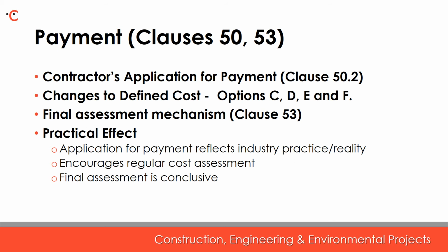NEC4 provides an obligation on the project manager to issue a final certificate of the amount due, either after completion of the contractor's obligations under the contract or upon termination of the contract. This introduces rigorous timescales. The project manager must issue the assessment within 4 weeks of the defect certificate or 13 weeks of the termination certificate.